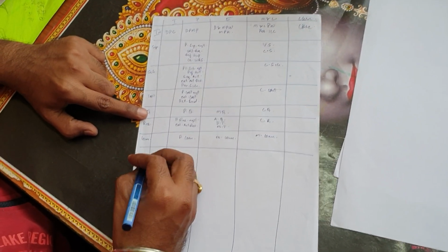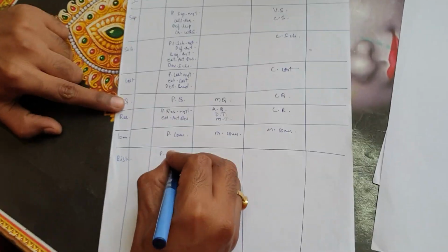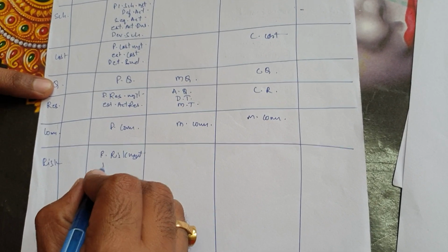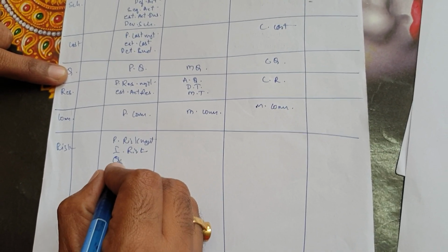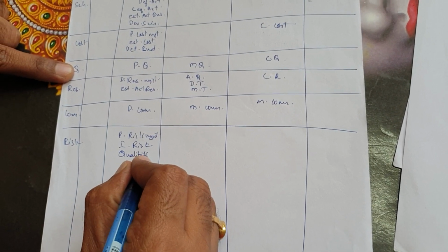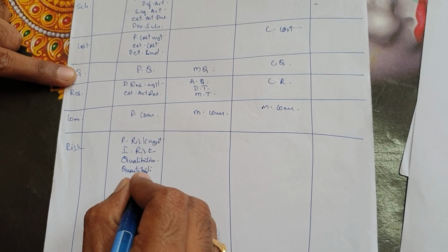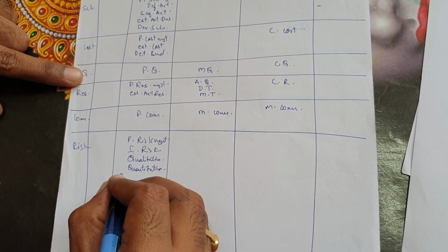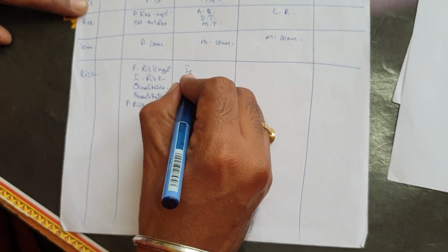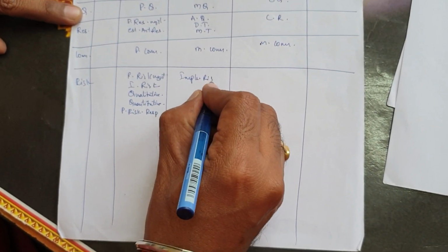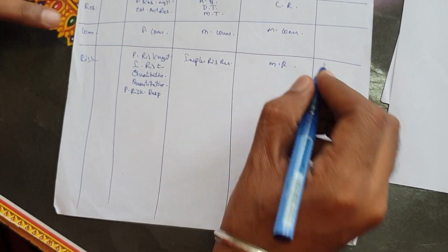After communication, it is risk. Plan risk management. You identify risks. First is qualitative analysis, and then quantitative analysis, and then you plan risk responses, then you implement risk responses, and then you monitor risks.